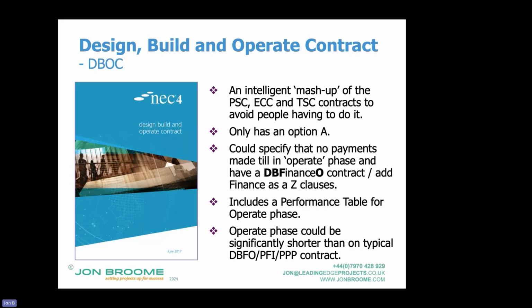So I want you to design and build it. Because you're operating it for 5 years, you will be looking at the operations phase. And if it doesn't operate, you'll get points deducted under the performance table and you won't get paid as much. So when you're designing it, even if it's 5 years rather than 20 years, you're going to look a lot more at how this will operate effectively.